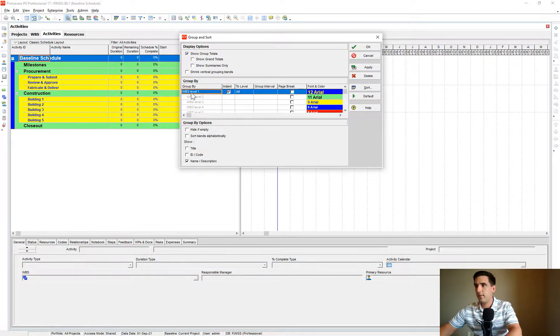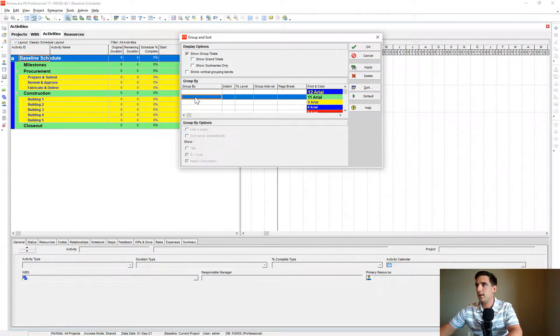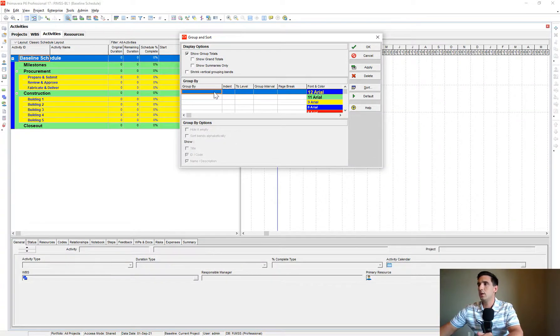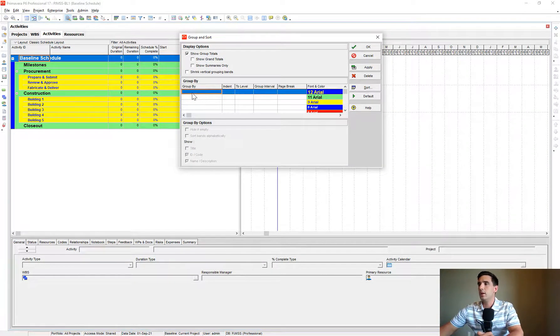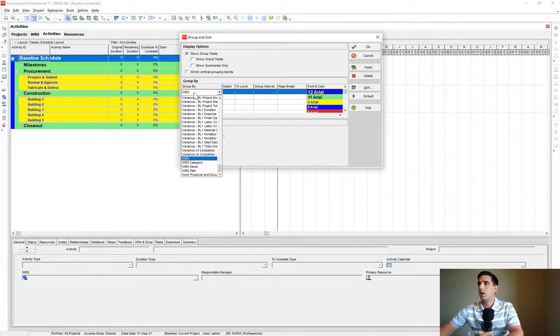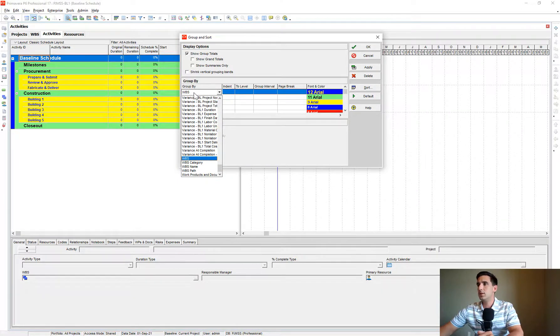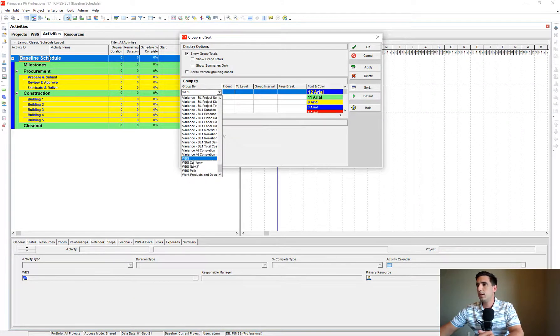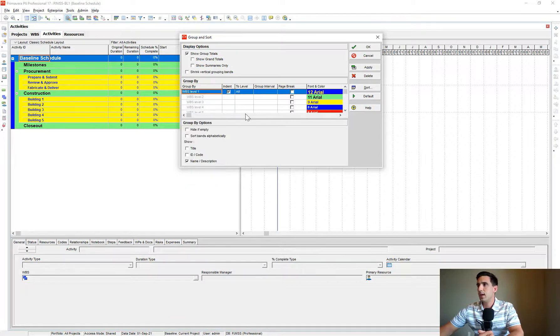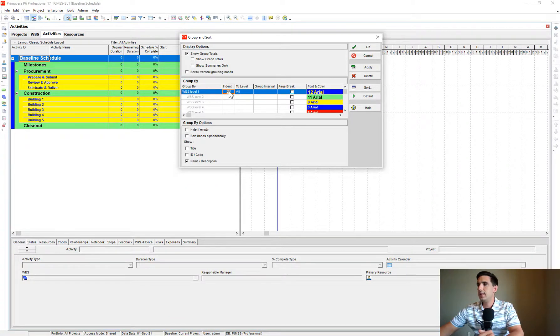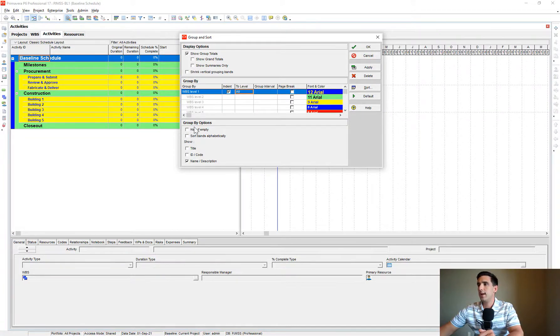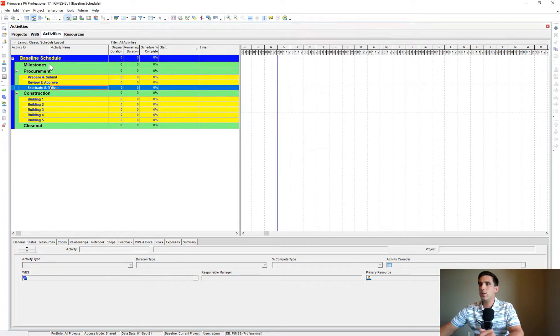If this here is blank and you're like, oh my gosh, what do I even do with this section here? What you're going to do is just expand that, scroll down to WBS, which is at the bottom, and then make sure that Indented is checkmarked. And we want it to all levels. And we want this Hide If Empty to be unchecked. And that's how we get it.